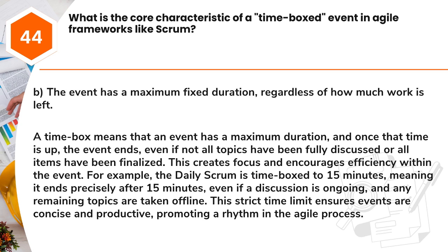For example, the daily scrum is time-boxed to 15 minutes, meaning it ends precisely after 15 minutes, even if a discussion is ongoing, and any remaining topics are taken offline. This strict time limit ensures events are concise and productive, promoting a rhythm in the Agile process.